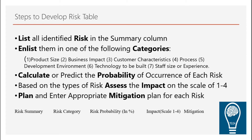Then calculate the probability of each risk and assess the impact. If a risk falls in the business impact category or involves a technological upgrade outside the project manager's control, it must be rated as very high impact. As discussed in the last video, different types of risk have different impacts. Finally, you define the plan to mitigate those risks.